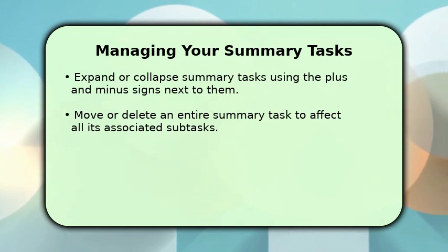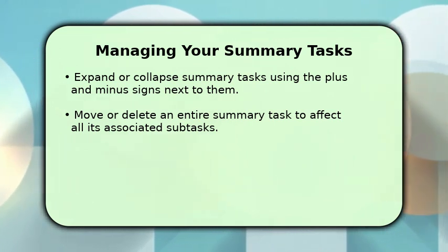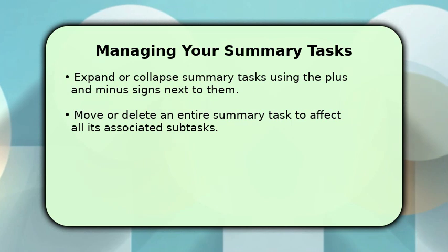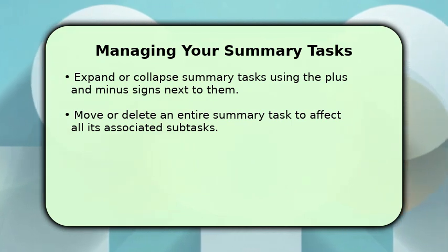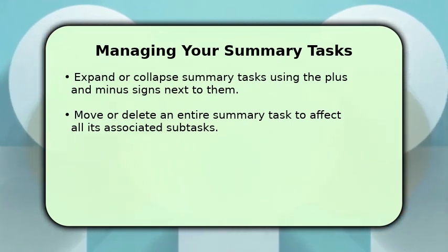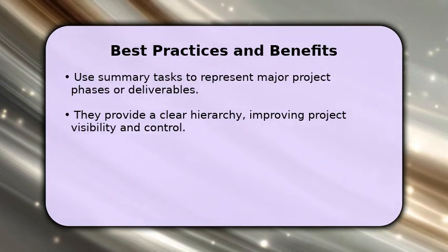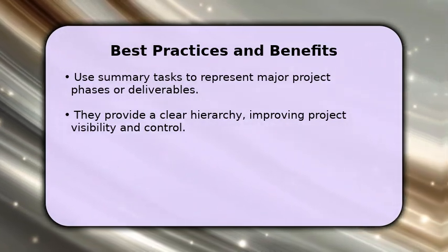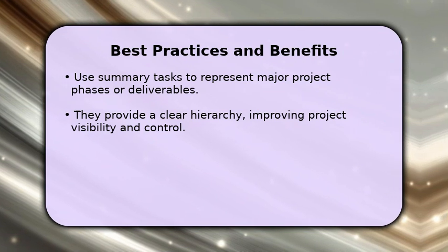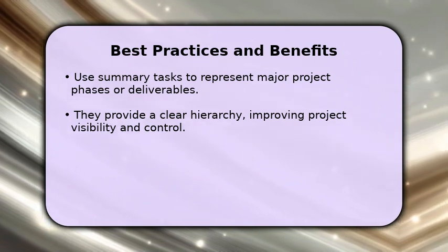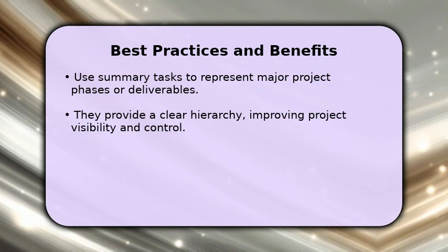Moving or deleting a summary task will also move or delete all its subtasks, ensuring your project structure remains consistent and organized. For best results, use summary tasks to define major project phases or key deliverables. This approach creates a clear, hierarchical structure, making your project plan much easier to understand and navigate.